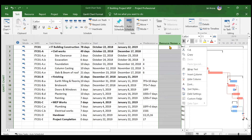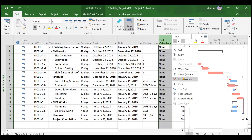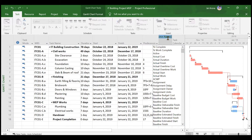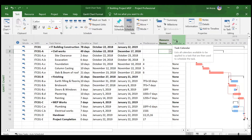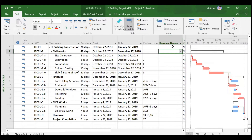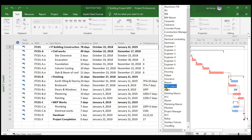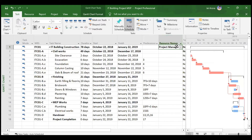If the resource name column is not visible, click 'Insert Column' and choose 'Resource.' Increase the column width so it is visible. The first resource is the project manager. Choose the project manager here — the resource has been allocated to this summary task, making them applicable to all activities. This person will take care of the complete IT Building Construction project.